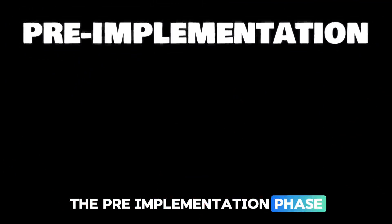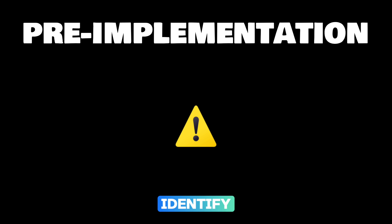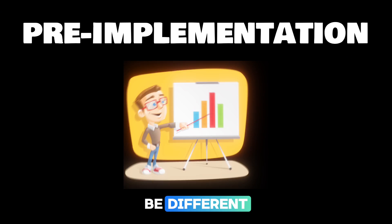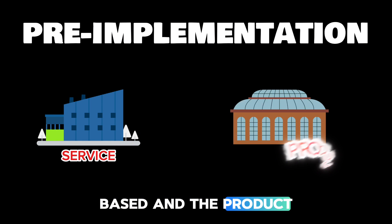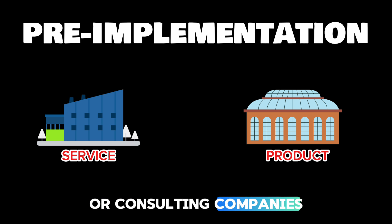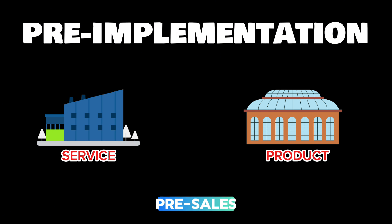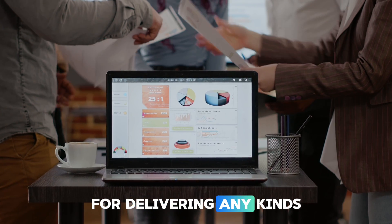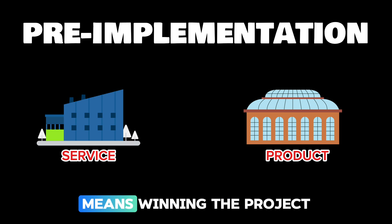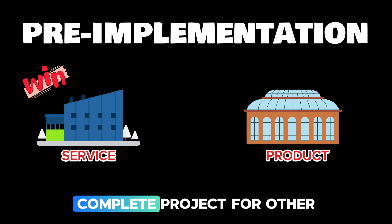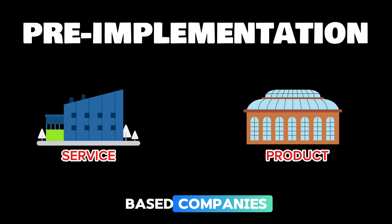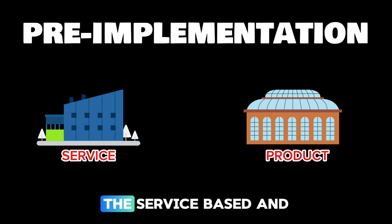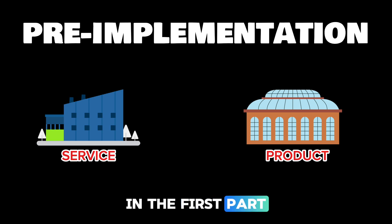Firstly, let's see about the pre-implementation phase. In this phase, the key thing is to identify why a data engineering project needs to be done in the first place. The approach for this is different when comparing service-based and product-based companies. In service-based or consulting companies, this phase is also referred to as pre-sales. Service companies work for other organizations delivering software solutions, so pre-sales means winning the project contract to build a complete project for another organization. Product-based companies, on the other hand, build the project for themselves based on their users' needs and business requirements.